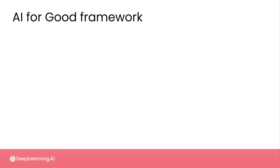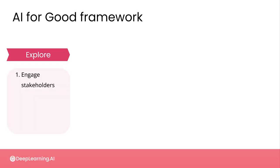In general, AI for Good projects, like pretty much any project, happen in a set of stages or phases. I've broken up the project lifecycle into four phases. The first is an explore phase, where you're connecting with stakeholders, defining the problems that you want to work on, evaluating feasibility, and determining whether AI can add value as part of a solution.